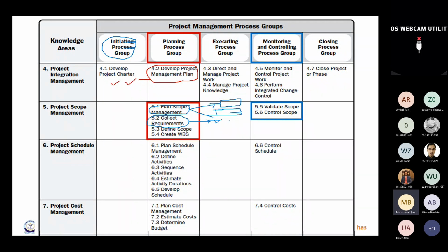If you do not get the correct requirements in the beginning, later in the project you may have to add new requirements or change them, and changing or adding requirements in later stages would cost you a lot. So it is always better to gather all the possible requirements right in the beginning.